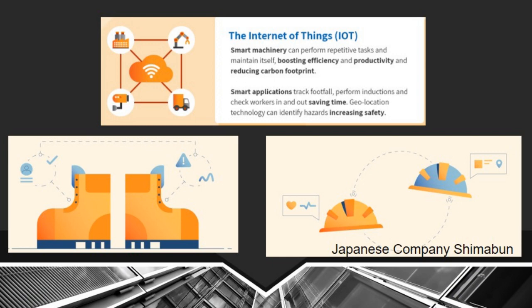For example, you need some delivery of cement at your site. So you can track the lorry in which the bulk cement is coming. According to the real-time positioning, you can define your activities and manage things. So IoT is also helping a lot. Some smart cameras and smart machines are also helping you a lot when you need to manage a diversity of human resource and the huge and wide scope of work.